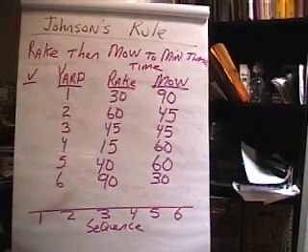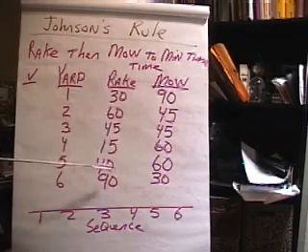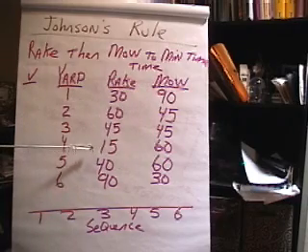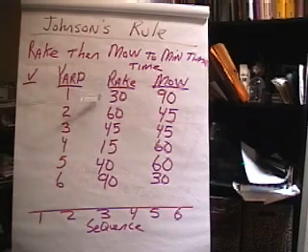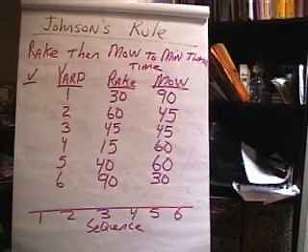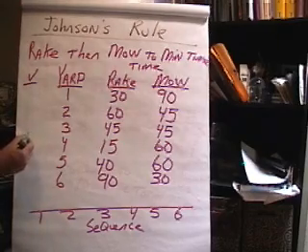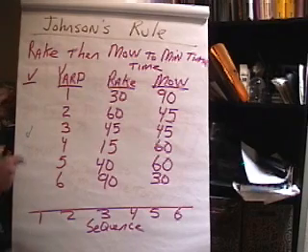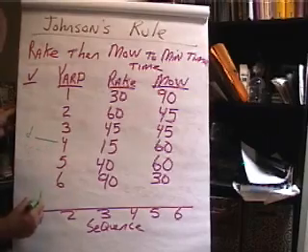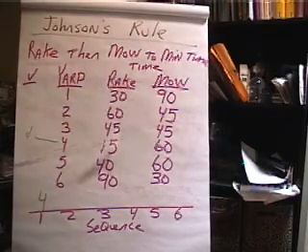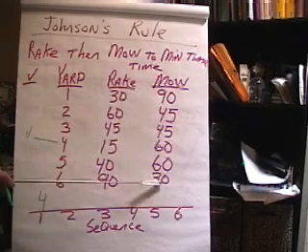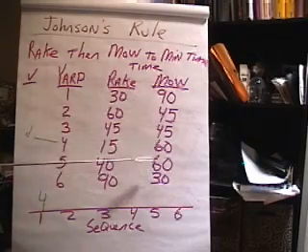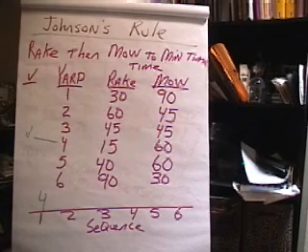You look at all the times on both columns, and the one that's minimum is the one that we assign first. Okay, the 15 is the lowest time, and notice that that's on the first list, the raking. So we'll put a check there under 4, and we'll put that job first at the beginning of the list. So that's job 4. If it's on the first list, then we put it at the beginning of the list. If the lowest is on the second column, the second job, then we put it at the end.